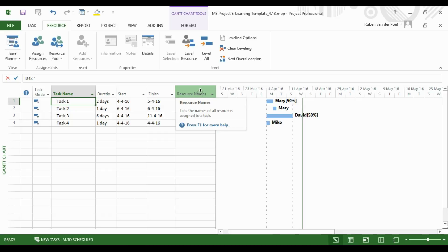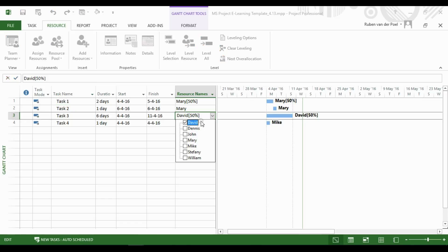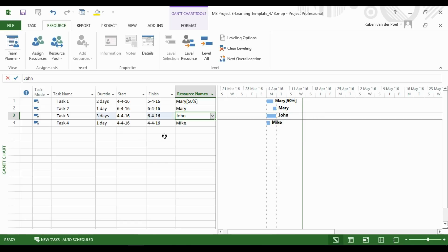However, here you should be really careful, because MS Project will see this as two separate actions, and it will first delete the old assignment with a set percentage of your resource, and then it will create a new assignment based on the max units for that resource, and any part-time percentage of the task you had set will be gone.